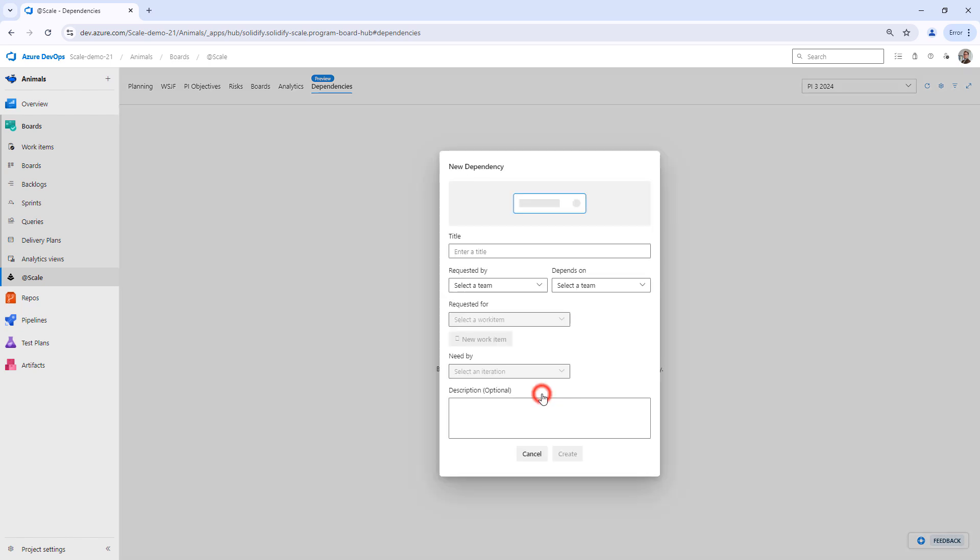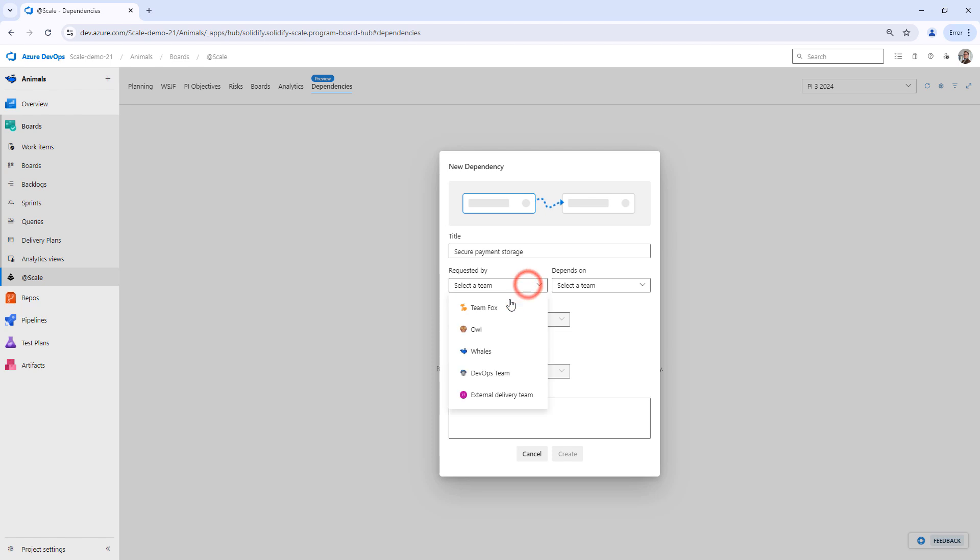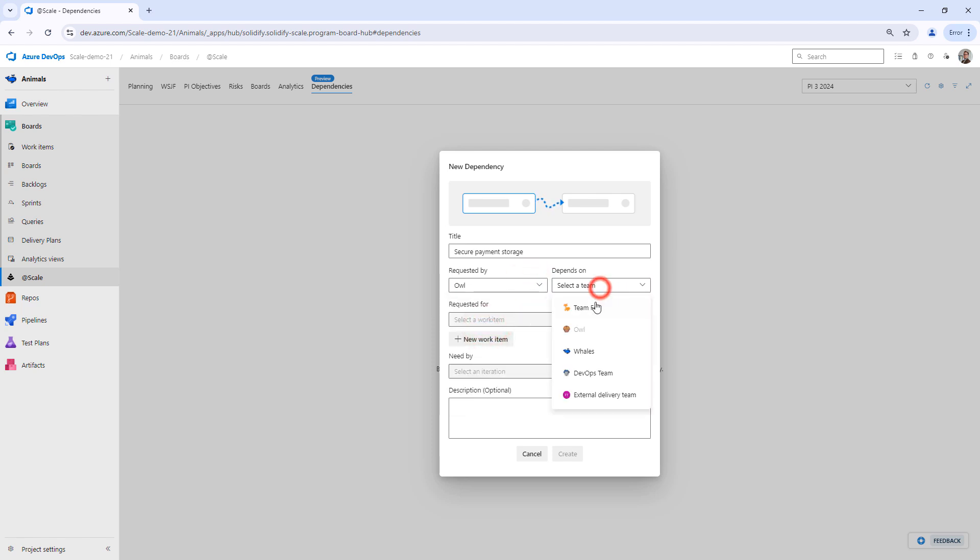By clicking New Dependency, I can then fill in a title for what I need. In this case it's going to be secure payment storage, and I select that I requested from Team OWL and I'm dependent on Team Fox.